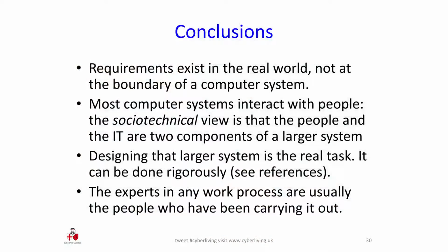And finally, the point that the people who are carrying out processes do need to be involved in designing the new ones. And if you don't do that, it creates a feeling of distrust and disrespect, as well as losing access to the real expertise in the practicalities of the job being done. So the notion that you can impose business change on people by giving them an IT system that sort of rolls out idealised processes is really dangerous. It's another mistake that the National Programme for IT and the Health Service